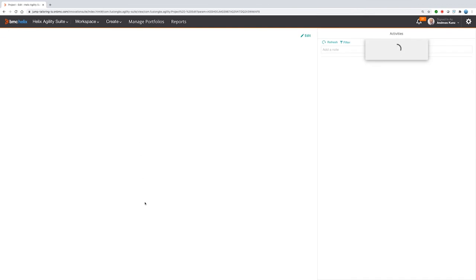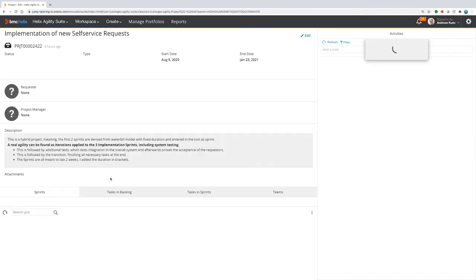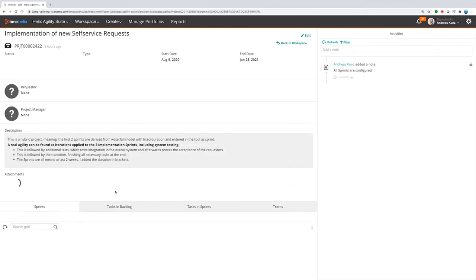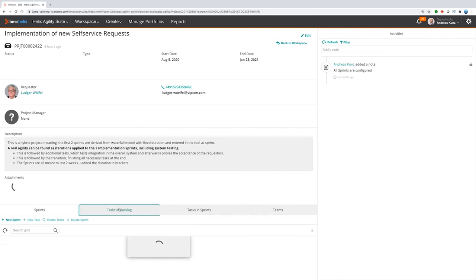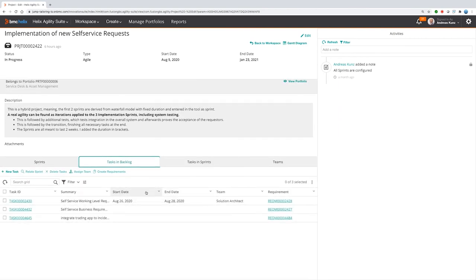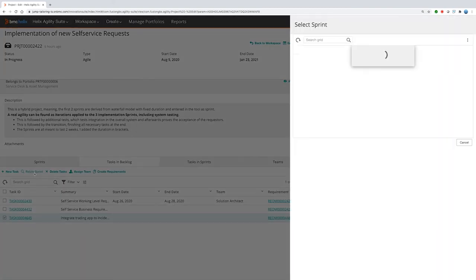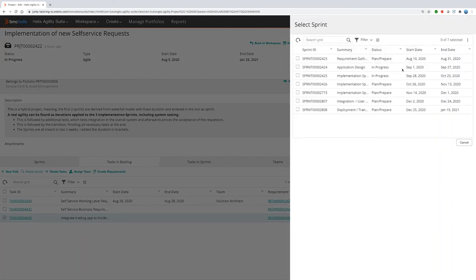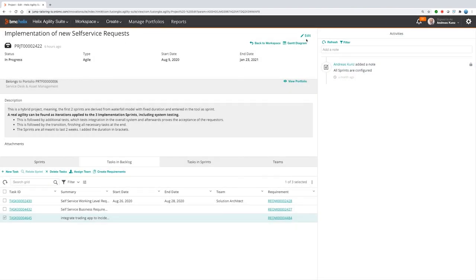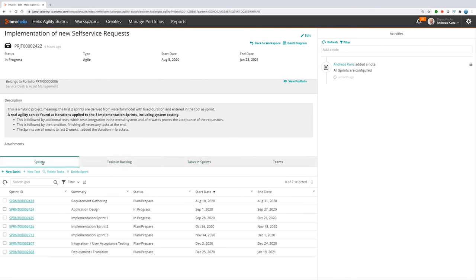So if you have project tasks that are in the backlog in the project, you will see them here within the tasks in backlog. If you want to have them implemented, you need to select one of the tasks, for example, that one, and need to relate a sprint to that project task. If you now want to select a sprint, you just need to use one of them, for example, that one that is actually in progress and can select it. Now we have created a task that is in the sprint and gets realized.